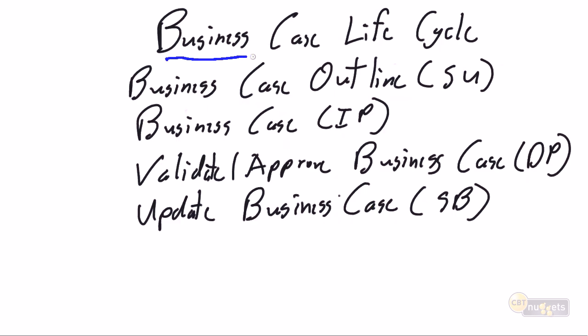And to draw this discussion on the business case to a close, I want to put the business case work into the overall Prince2 project management lifecycle, recognizing that the business case repeats itself, lives throughout the entire Prince2 cycle. We're going to generate the initial business case and probably at the outline in the startup of the project. And this is where I'm going to validate that you truly remember all of those acronyms. So during project startup or starting up the project, we're going to work with the business and we're going to put that original business case outline together.